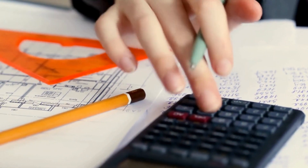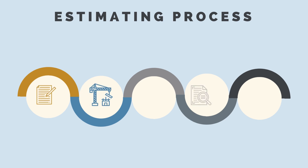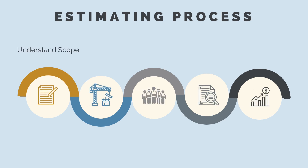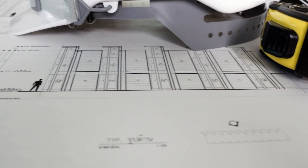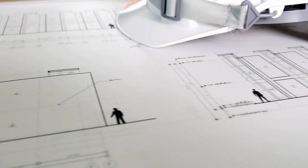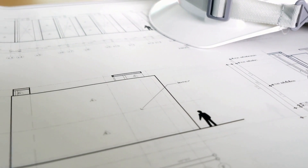Now that we understand the components of a cost estimate, the steps to produce the estimate will make more sense. At a higher level, we first need to understand the project scope by looking at the drawings and specifications. Next, we calculate our direct costs, which represent the majority of work in a cost estimate. Then we calculate our indirect costs — always after direct costs, since direct costs influence them. Finally, we work out our contingency and add on our profit margin. For this course, our main focus is on the direct activity costs.